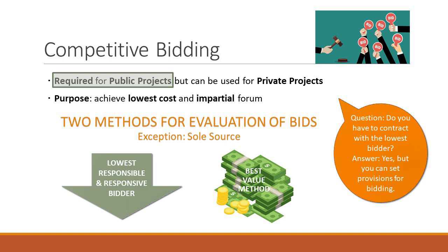So for that, what you need to do is draft provisions in the RFP that goes out that asks for their track record, and that they would have to have satisfied whatever these requirements or qualifications are. And you may not like them because they're hard to deal with, but if they come in at the best price and the project gets done, then that's the end goal of the public bidding statutes. But if their projects come in over budget and you look at their history, maybe then they won't have qualified under one of the responsive qualifications.